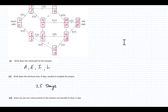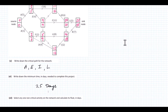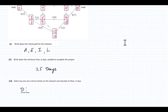Select any one non-critical activity and calculate its float. I'll take D — it's non-critical. The early time is 3, it takes 9 days, so it finishes at 12 days. The latest it can be finished is 16 days. So the float is 16 minus 9 minus 3, which equals 4 days.